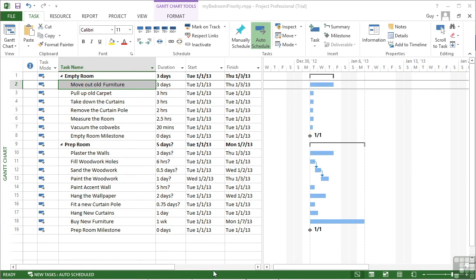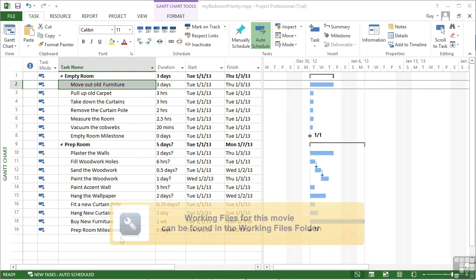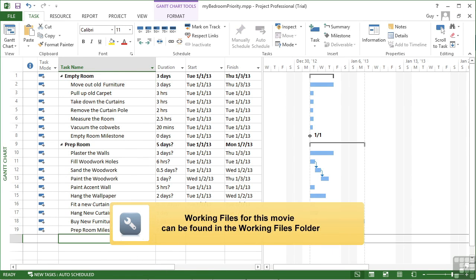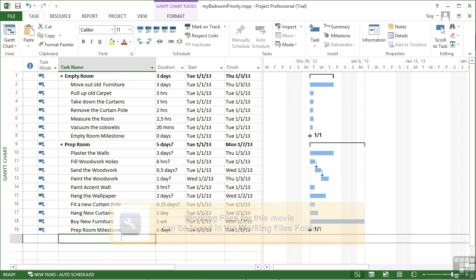Using the file MyBedroomPriority, we're going to explore the priority values of tasks. By default, all tasks are given the same priority number of 500.